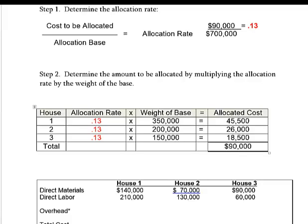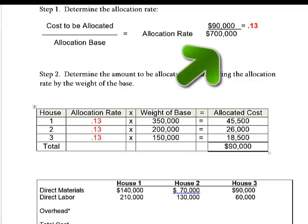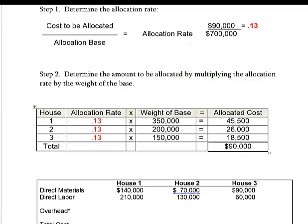These allocations add up to $90,000, though note that 0.13 was rounded — the precise figure is 0.128 and continuing decimals. So for house three I forced the number to make the total allocation exactly $90,000.